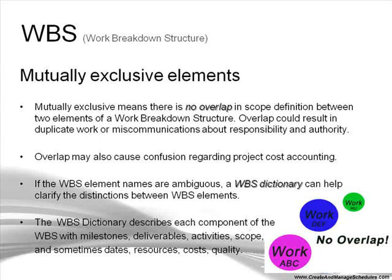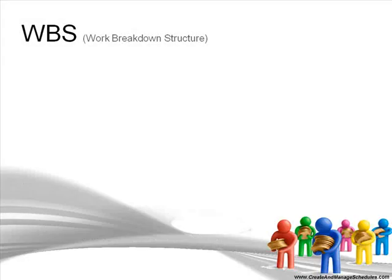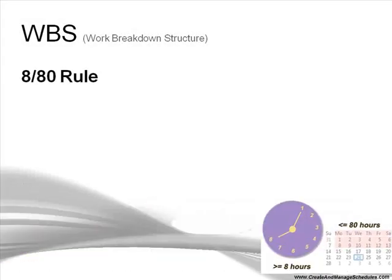The work breakdown structure dictionary describes each component of the work breakdown structure with milestones, deliverables, activities, scope, and sometimes dates, resources, costs, and quality.